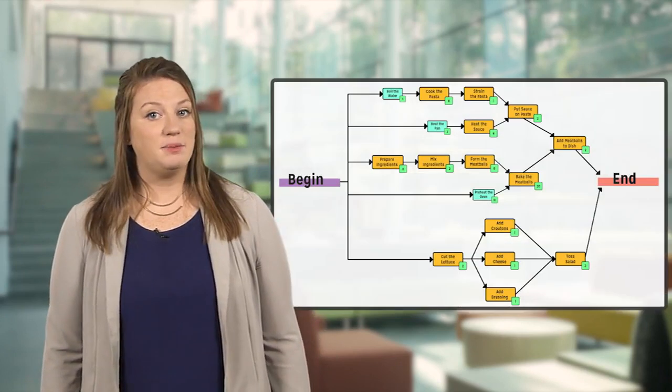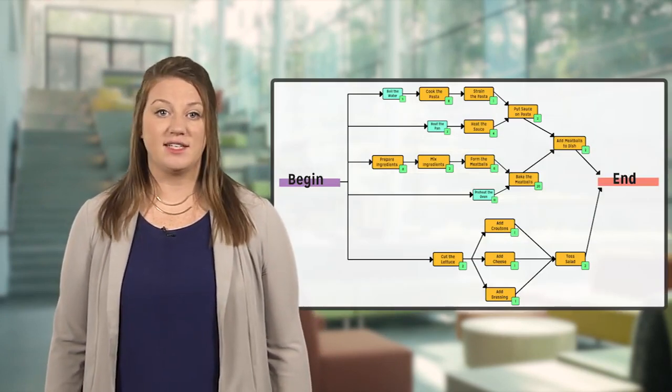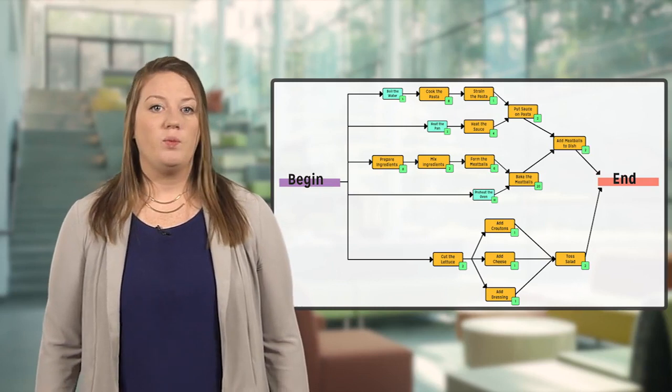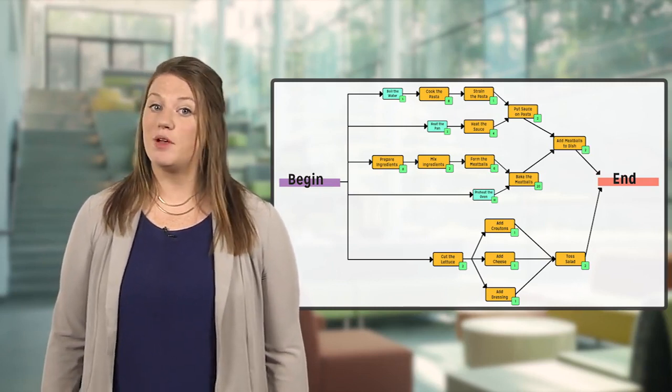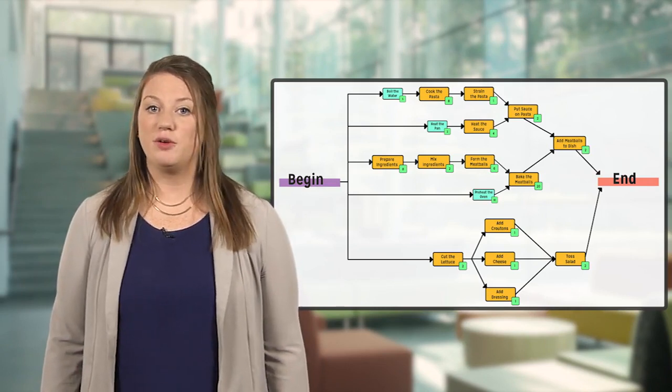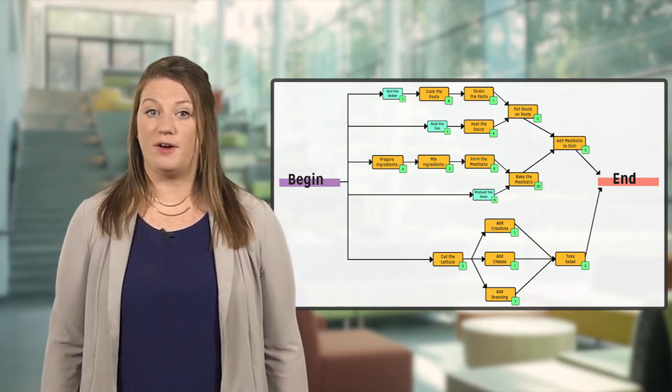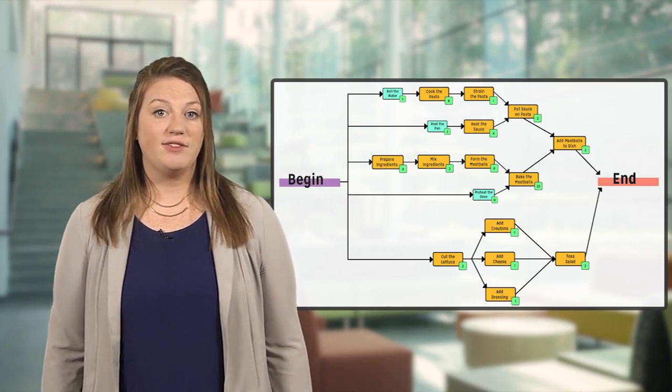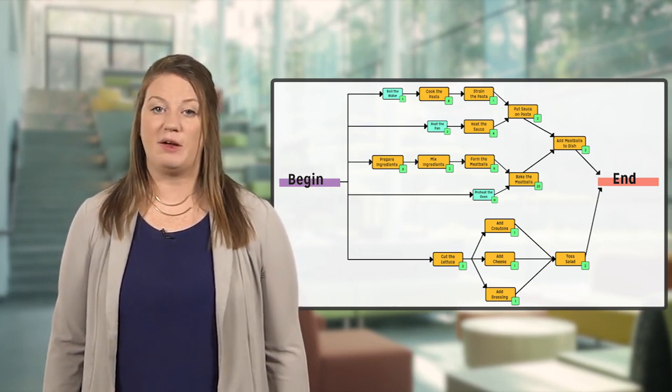If you recall from our work breakdown structure, when we added up all our estimates, it said that it should take us 77 minutes to complete. This would be assuming that we are completing each task one after the other. A CPM chart shows us what tasks can happen in parallel. We can make our salad at the same time that we are making the meatballs and the pasta. A critical path will show you the minimum time that you could complete all the tasks. This might have to involve additional people to take on parallel work.